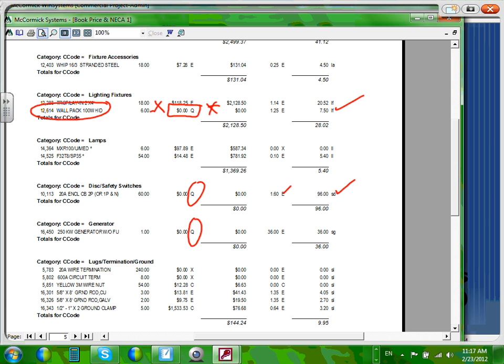No, we know if the material is coated, as in all the lighting fixture, all the electrical equipment, then we assign a $0 value for the material and a labor value for the material from the software. Everybody got that one? Only the coated material, which is all the panels, all the lighting fixtures, the generator, the transformer. We don't have transformer in this one. Can I have thumbs up, guys? We understand that? Okay. Lady and gentlemen, this will be report number 1 that you need to print for Chad.